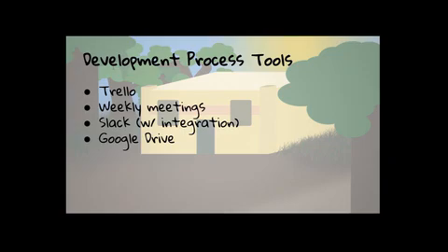So now I'll talk about how our teamwork worked out and what our process was like as a team. We used four main tools, the first one being Trello to keep track of our tasks and progress. We'd put all our sprint task lists and our product backlog onto the Trello. People would claim the different tasks and then be able to say if they were doing them, if they were done, or if they hadn't started.